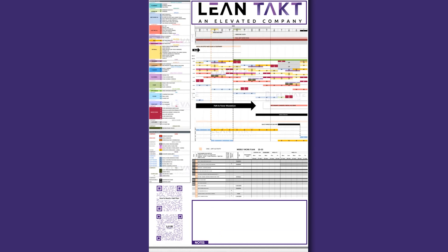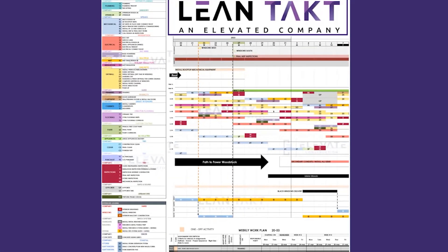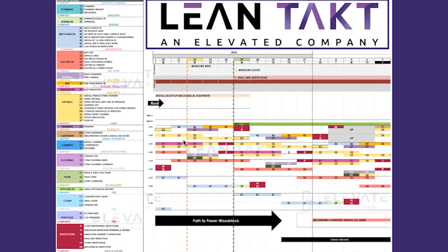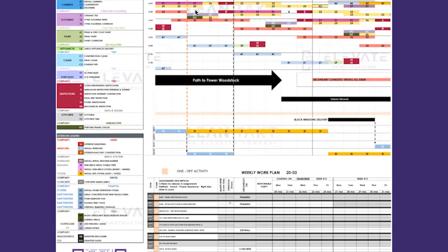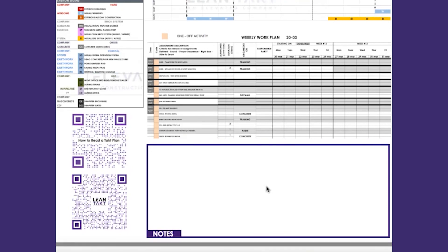Here is a killer example from our friends over at UrbanCorp. They wanted an actual two-week look-ahead from their current week so they can go out and do field walks. On the left you'll see the legend for the tact wagons — the activities that encompass the project — and then you can see how they show up in a matrix format of time and location in our typical TACT planning format. Down at the bottom there's a one-off activity area as part of their weekly work plan covering two weeks ahead, plus a place for notes.